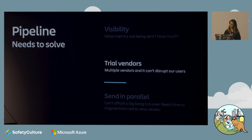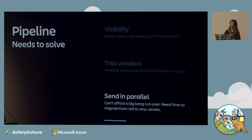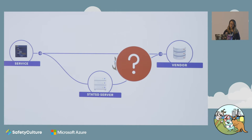The second thing we need from our pipeline is a way to safely trial potential vendors and see if they can handle our current load of metrics. It's really important that whilst we're trialing these vendors, we don't impact the current stream of data going to our existing vendor — otherwise this will disrupt our ability to get insights into our systems. And finally, we needed a way for the new pipeline to send data to both the old vendor and the new vendor once we had chosen them. We needed a migration period — just cutting over to the new vendor straight away is way too risky. We need time for users to set up their dashboards and alerts and be confident they're working.